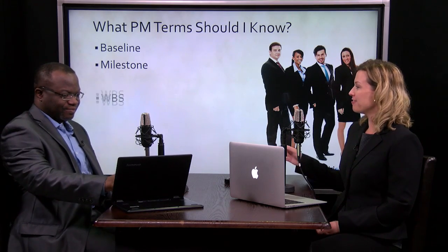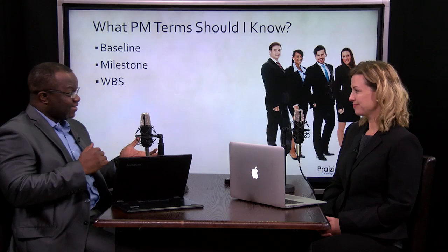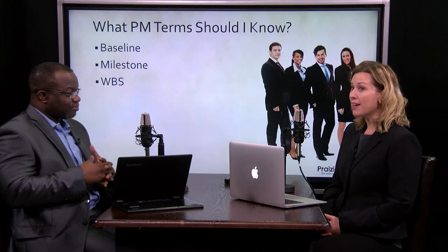Well, we also have a WBS. What does that stand for? Work breakdown structure. And this term is used loosely in scheduling because people think their WBS is their schedule, but it's not, is it? No. The WBS is 100% of the work that needs to be completed in the project. It doesn't have to be drilled down to the activity level, especially for very long projects or iterative projects.